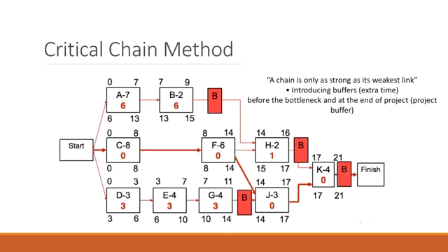Having said that that's your end date, that project buffer is going to give you a couple of days after that, just in case the project is taking longer, just in case the critical path analysis or the tasks within the critical path analysis have actually taken longer. Then instead of saying that it's going to complete in 21 days, you are going to say that it's going to complete in 26 days.